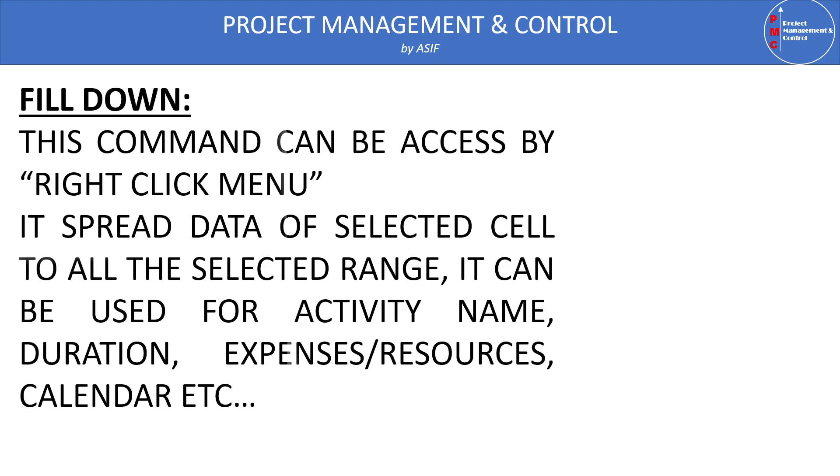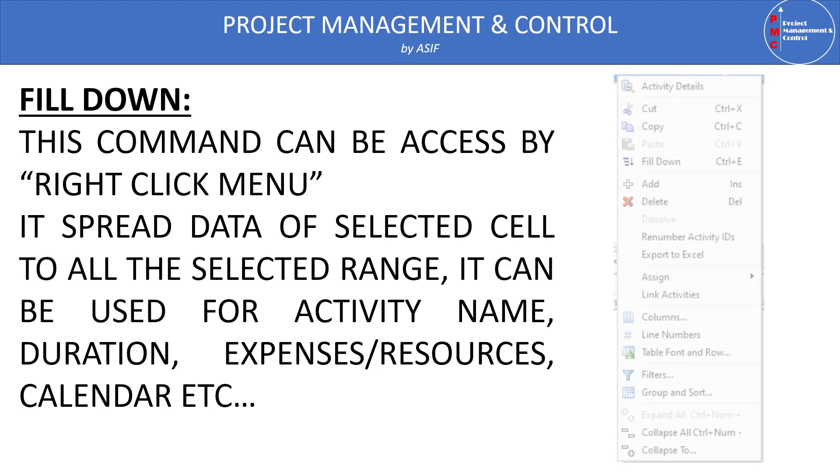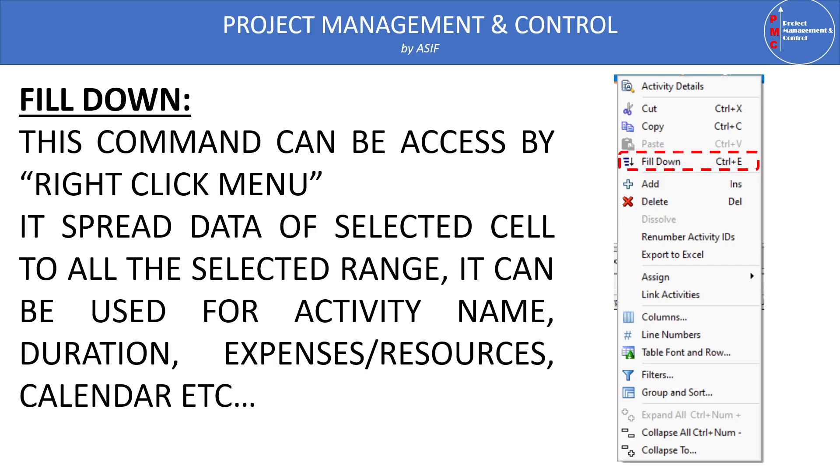So the fill down command can be accessed by right click anywhere on the Primavera table area, and then you will find the fill down command. Alternatively it can be accessed by Ctrl plus E. So this command has two ways to access. And the use of this command is that when we select our cell and after selecting the cell we select our range, then we right click and select the fill down.